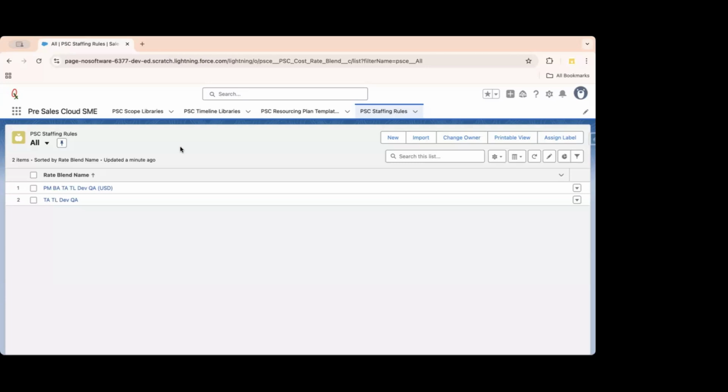That kind of model we usually work in, and still in India we usually work in that blended rate model. Now a question generally arises whenever we go into a transformation kind of project. The first question the customer asks is, hey, how much will it cost me? Generally, I'm not committing to anything, but at a high level, because I want to secure my budget, something like that. This blended rate will also help you get that rough order of magnitude.